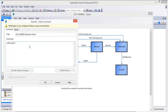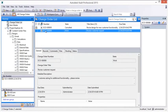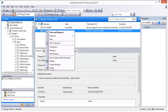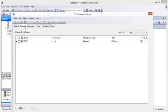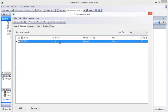Once a change order is deemed valid and processed to the point that designs need to be changed, designers have the authority to edit the impacted documents by moving them into a work-in-progress state. At this point, the system automatically accomplishes a preliminary revision bump.